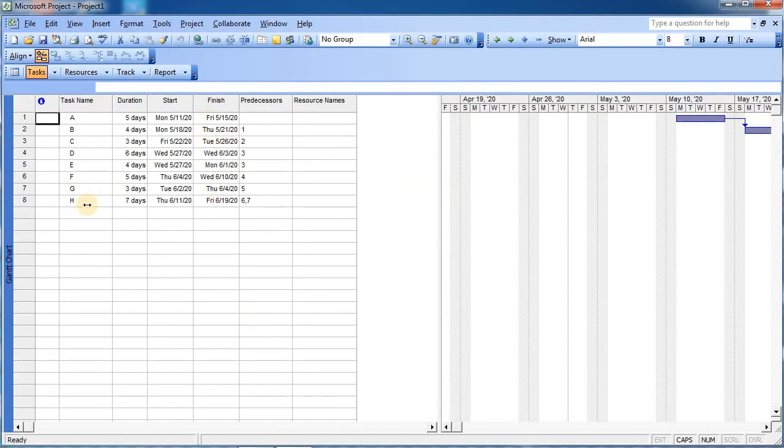Now all these activities come under one project. So the total duration of the project needs to be shown under a proper head, which means all sub activities should be arranged under the main heading. As of now we have not inserted the main heading, so we will select the first row and insert a new task there,